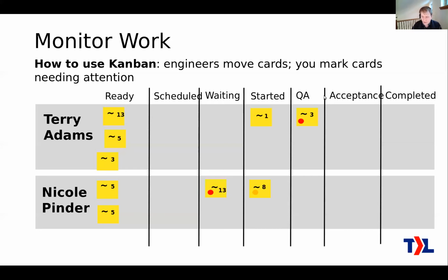As the project manager, you are watching all these things for those exceptions I mentioned. A ticket that has exceeded its budget, you might put a red tag on. Something that's coming close to its due date or its budget amount, you might put a yellow tag on, so it gets some attention. It's not a big problem yet, but it deserves a closer look. So you need to mark those things up so that everybody is focusing on those exceptions and addressing them as soon as possible.